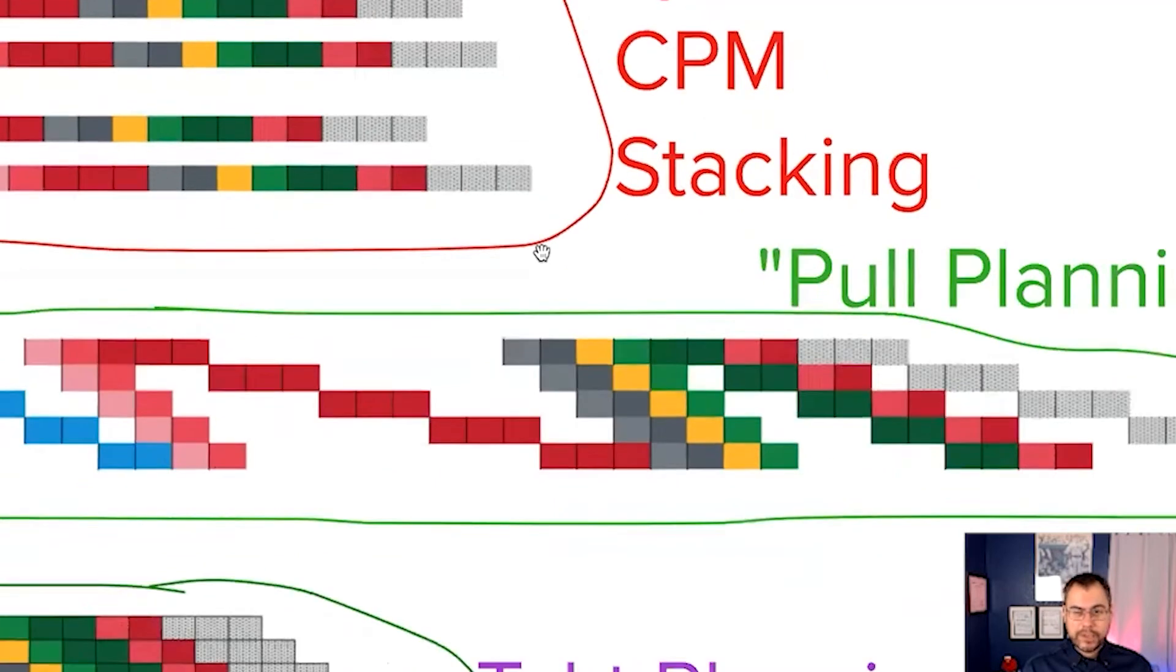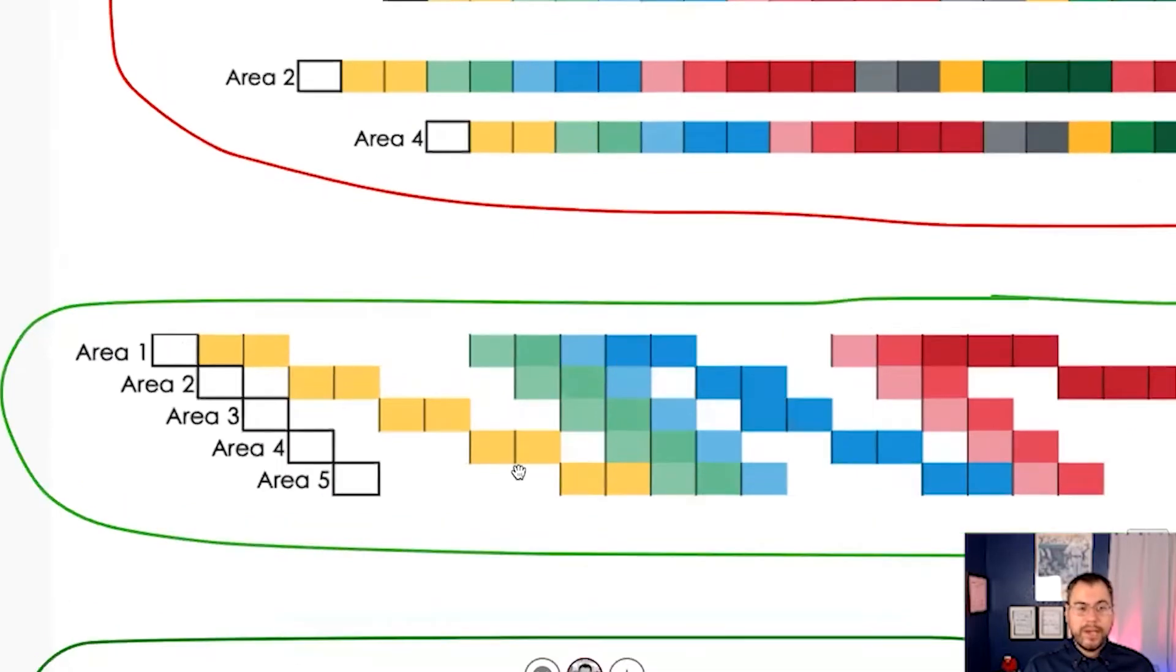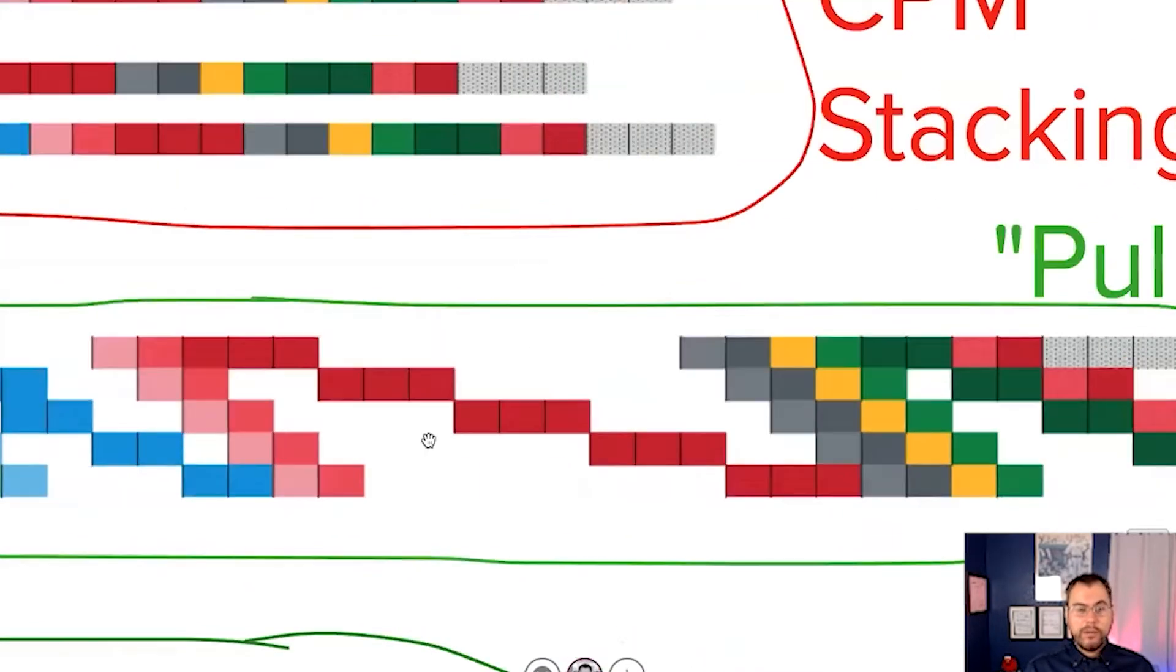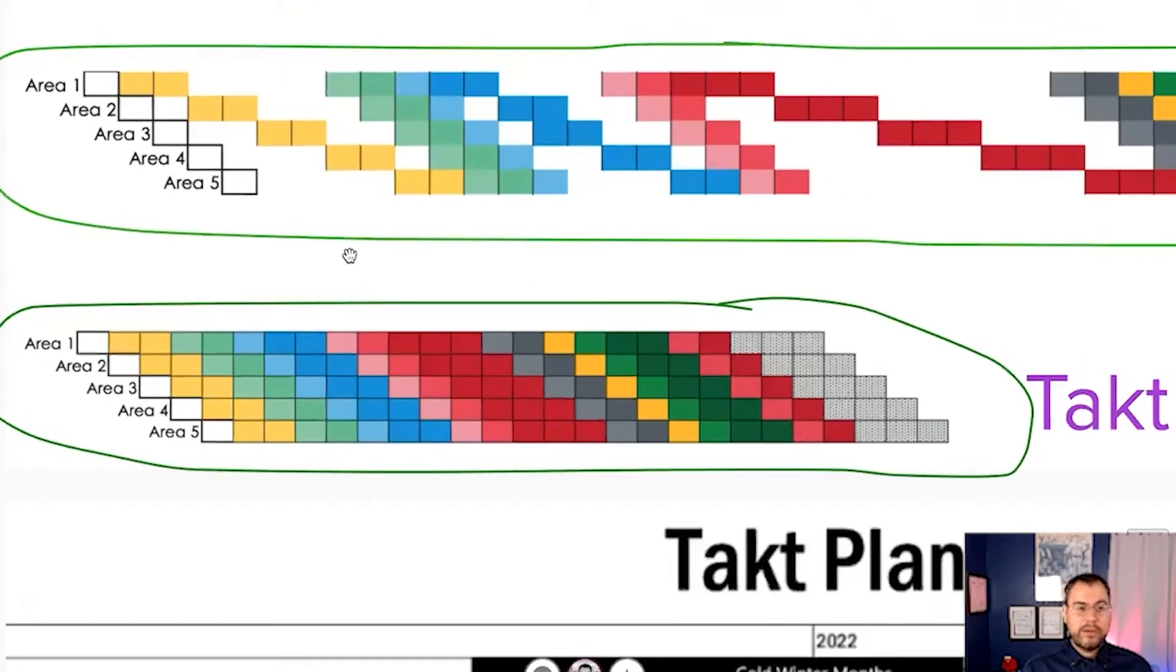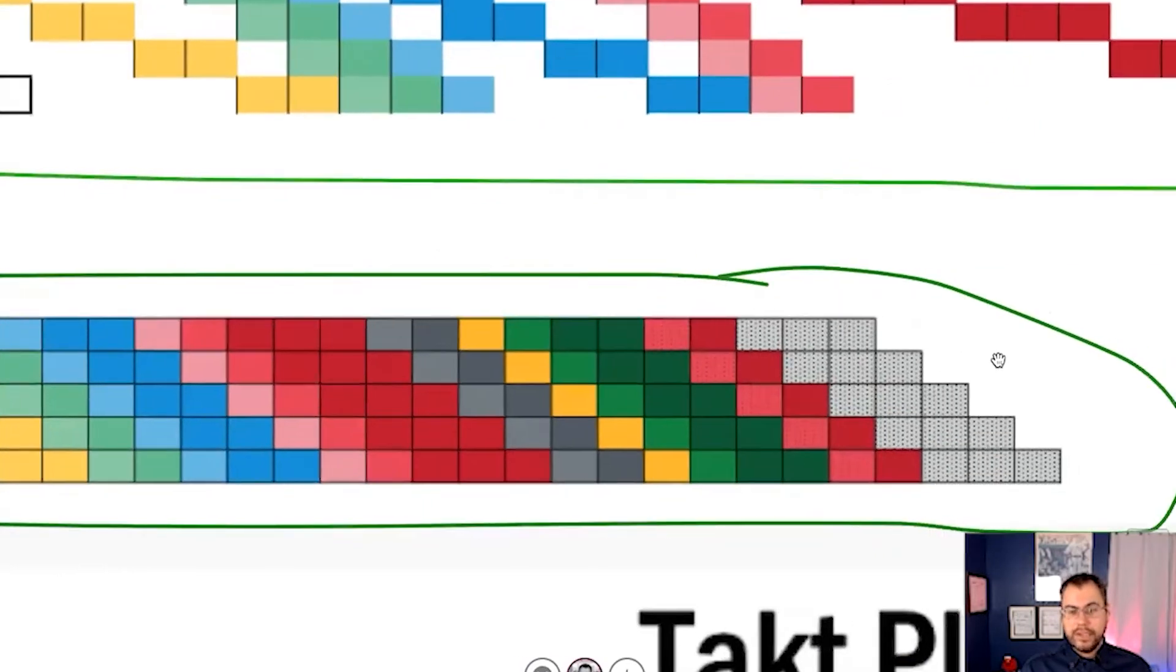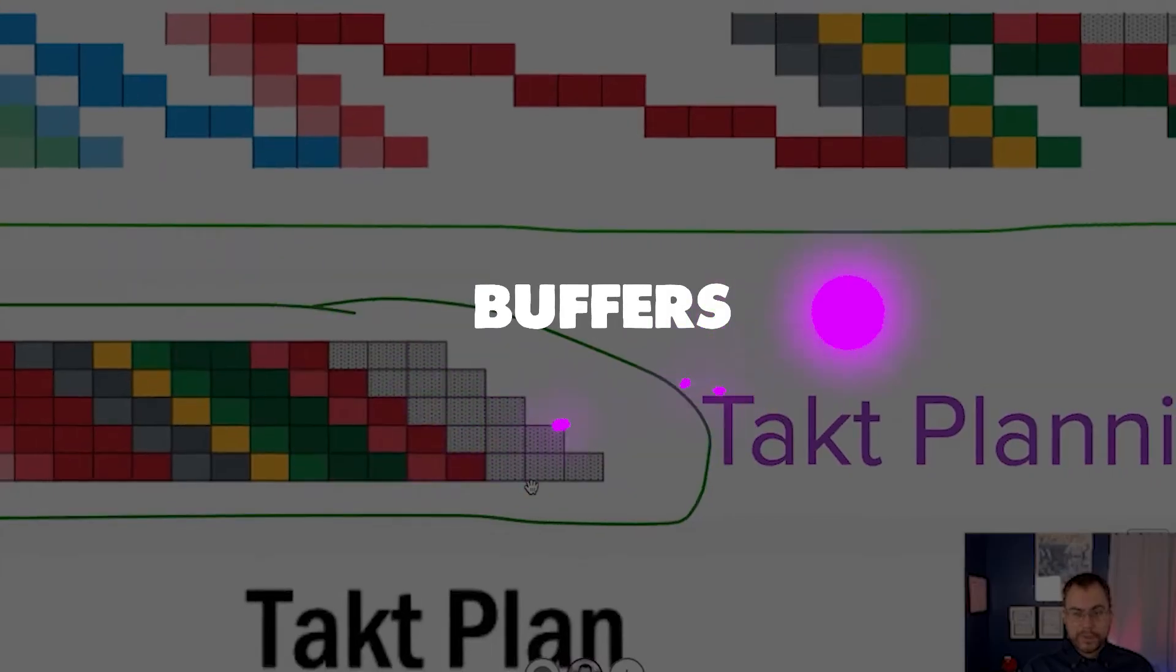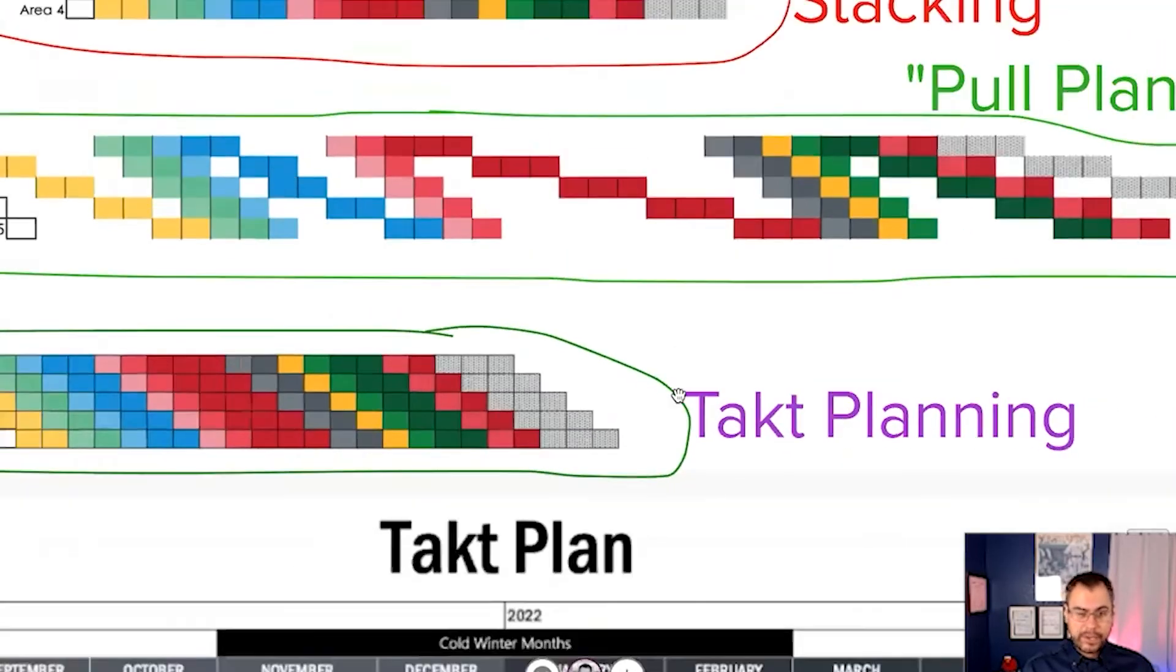In pool planning, if I just come down a level, or Last Planner System of Production Controls, we might organize the areas from one to five and create some trade flow here. Not getting people stacked, but we see we have some opportunities where we have these gaps of waiting. If we take the TACT approach, we can organize ourselves in such a way that we can do one area after another without stacking the trades or disciplines. Here you see it. Nice, sequential, all the way to the end. And we might even introduce the concept of buffers, or typically what we say in CPM language, float, to handle excess variation.